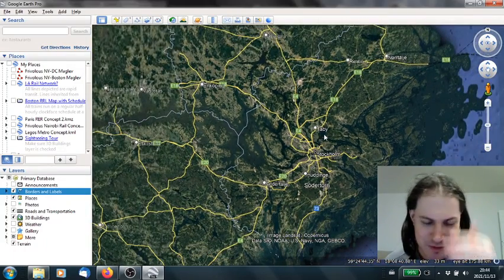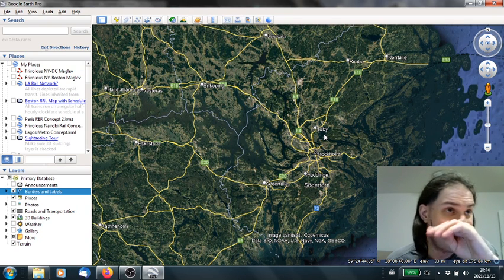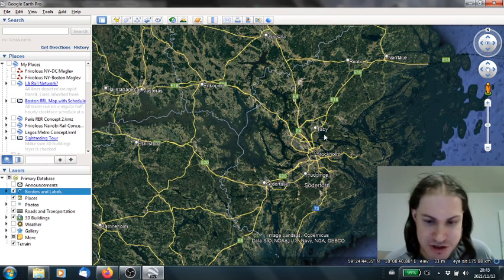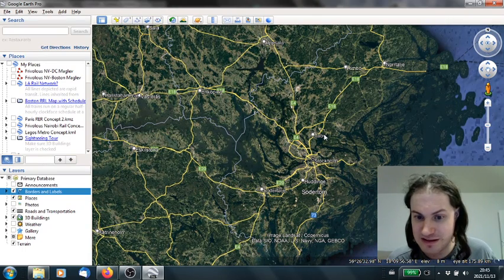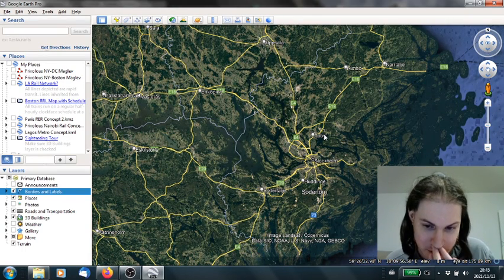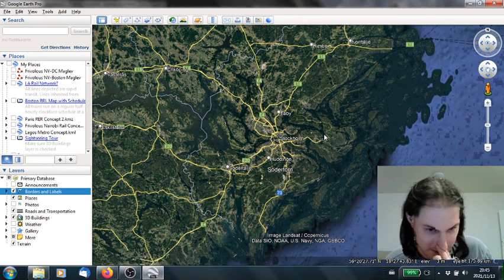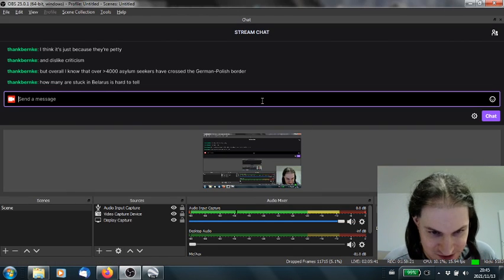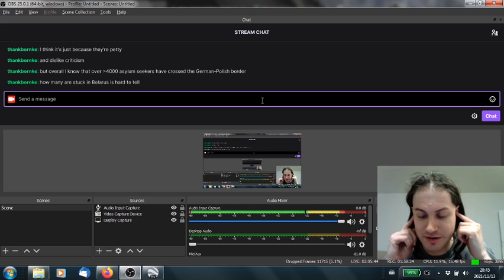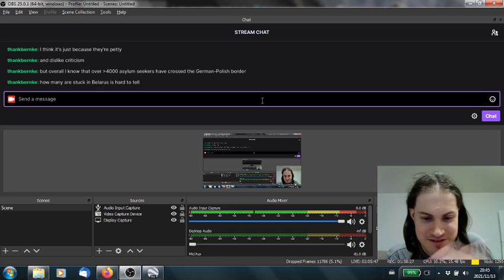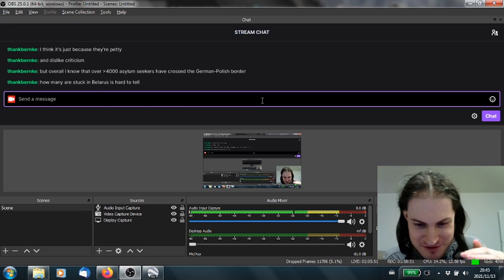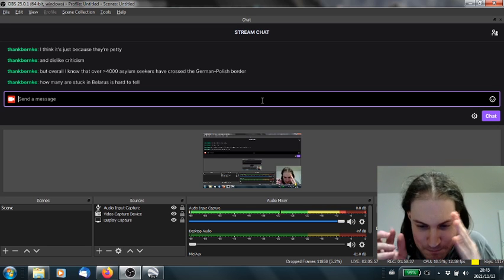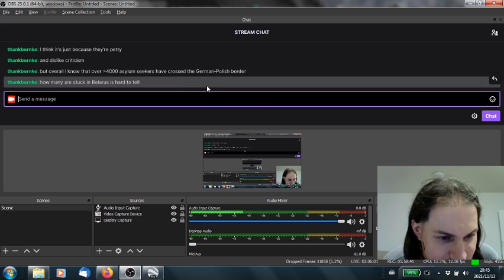It's something a lot pettier. At one point, the rock that is excavated, which used to be just rock that you could reuse, they reclassified as dangerous toxic waste, which needs to be properly disposed of. So that requires them to actually deal with the disposal, and as you can expect, rock is very heavy. So the dump trucks consume fuel they would not otherwise consume, and that is carbon taxed, and they also need to dispose of it. Again, it's a very petty regulation.